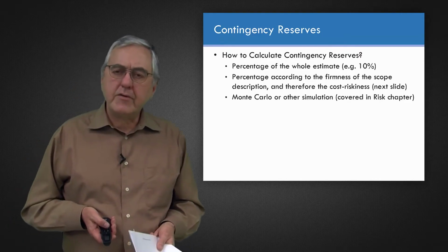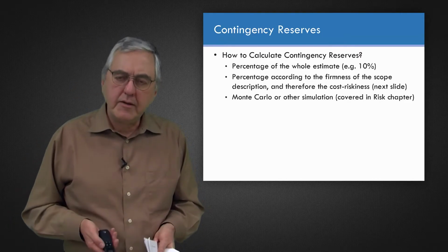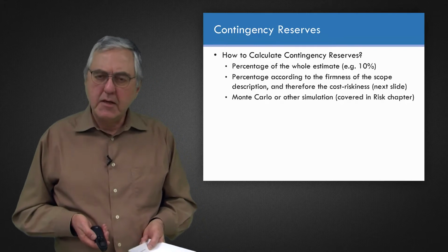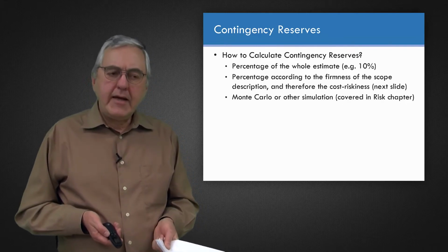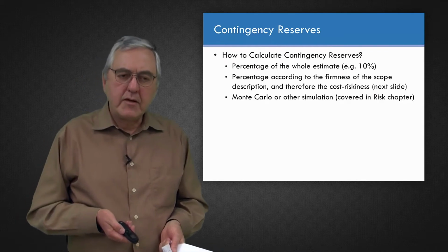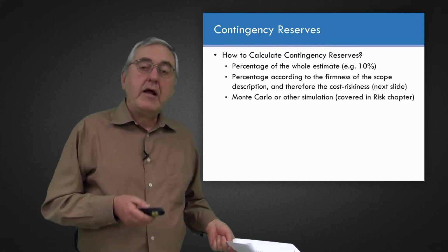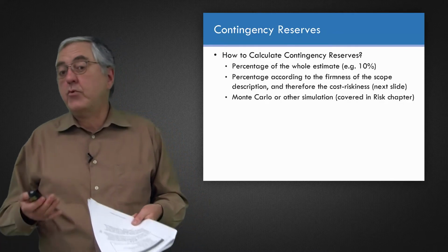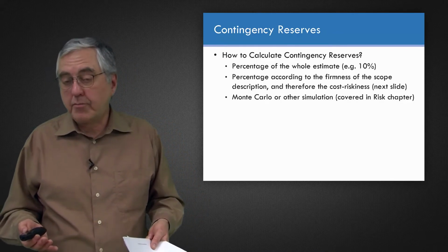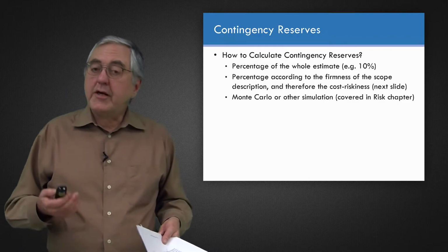A discussion about this would be appropriate in project risk management, and really it means it's a way to take the single point estimate of the project and raise it to a percentage achievability which you and your customer find appropriate, such as 50% or possibly 75%.